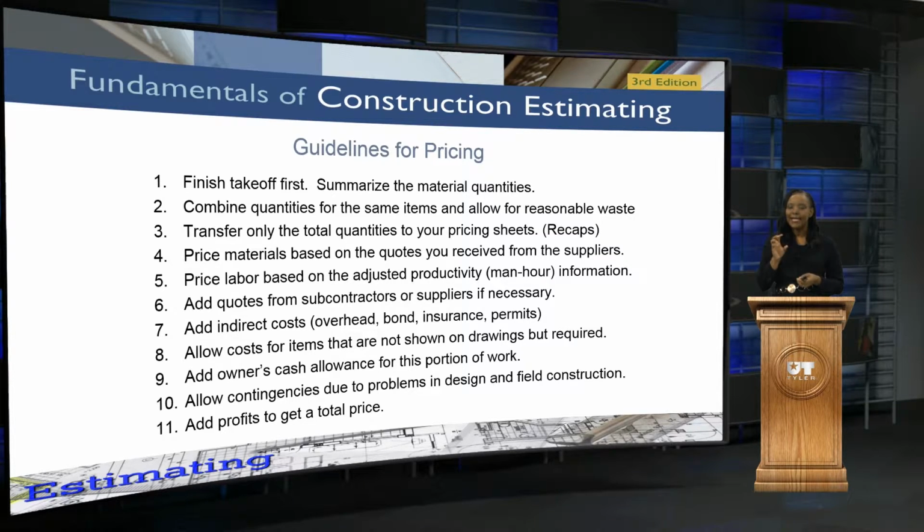Now, very key, and it's definitely important, is making sure that you actually take the time out to do your estimate, and then you're also going to price it. Now, there are various ways to price. There's the RSMeans that we'll look at this semester. There's historical data, which a lot of companies go off of quite a bit. But we don't have historical data, so we will concentrate on the use of the RSMeans cost data.